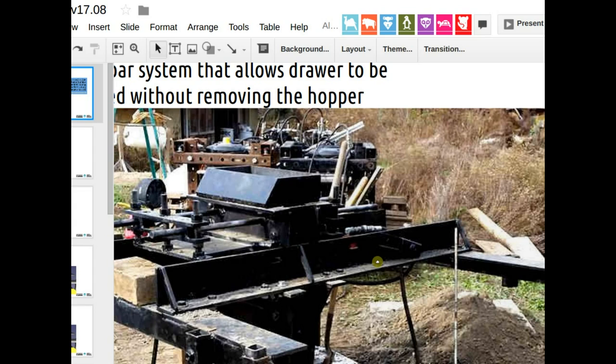It's how the drawer moves back and forth to load the soil. We couldn't do any of that work until way later when the arms were on, legs were on. So a later phase in a build. So doing this allows us to not only put the build, like the testing, the actual shakedown of the drawer while the frame is being built, but also it allows, when you decouple the drawer from the arms, that's like,